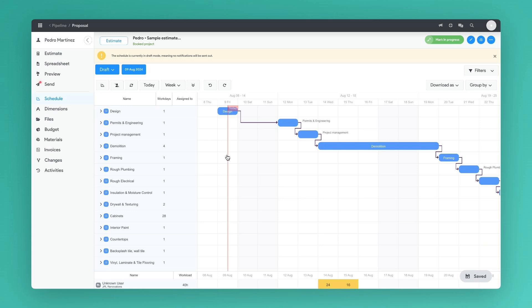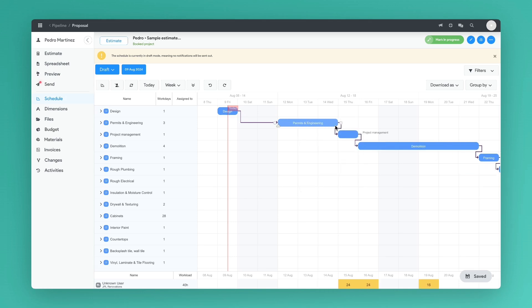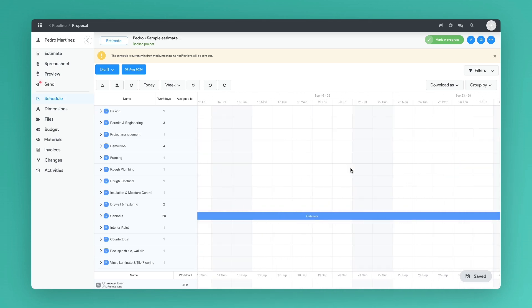You can edit the schedule in the app and by changing timelines of certain tasks, for example, the permits and engineering, the rest of the schedule automatically adjusts.